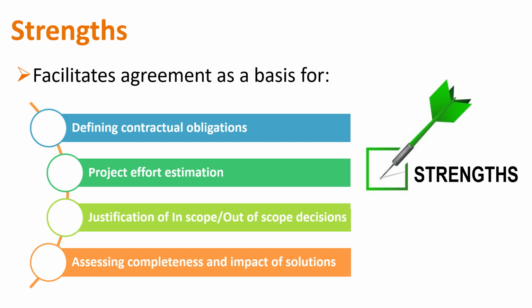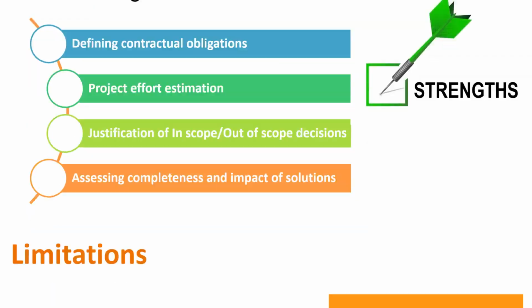And the other thing that it does is it helps us really think about impact, and it helps us get a lot more complete on that. So if I say, okay, here's the scope and here are the things involved, and I'm going to change this, I can see in that scope everything that's touching. And I can ask myself, okay, if I change this, does this specific change impact that or that or that? And that helps me much more readily define what is the effort associated with this change. What are all the potential things I might accidentally impact or purposefully impact?